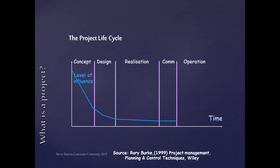Our ability to affect changes to a project significantly decreases during the first two phases. It's relatively easy to modify the project while it's being developed and designed. Once we start to realize or build and produce the project — for example by cutting metal or digging foundations — changes to the project are more difficult to implement.